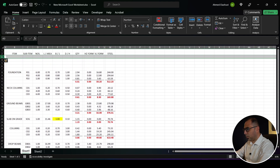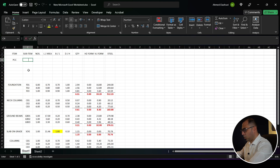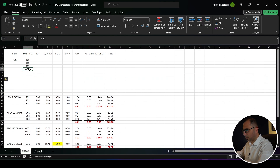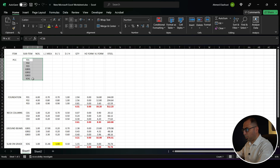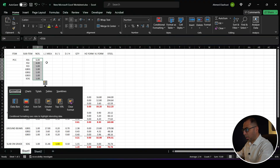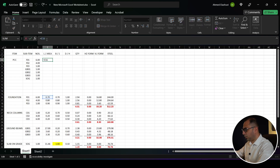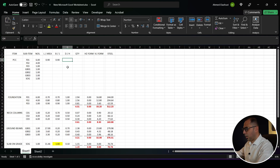I also want to calculate the PCC for the project, so I'll be adding some rows here. I have PCC for the foundations and also for the ground beams. I'll add more rows and also PCC for the slab on grade. If I copy the numbers down, it brings me the length, but I need the length plus 0.2 — that's an offset of 10 centimeters from each side — and I'll do the same for the other direction. The PCC depth is 0.1.